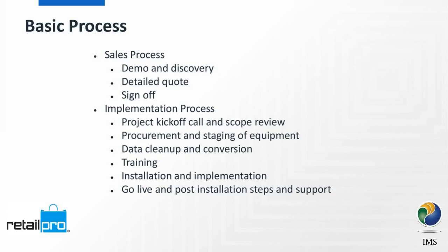And this is important, I think, for people to understand and have an expectation of what that means, right? So there's go live, which is we're turning on Prism and you're starting to use it. There's post-installation steps. These are going to be some of the tweaks, the changes, the things where you said, hey, I want this set this way, but now that we've tried it for a day, let's change it to this way. And then the support, where you're going to get fully turned over to the support desk as anybody else with day-to-day issues or concerns or questions.